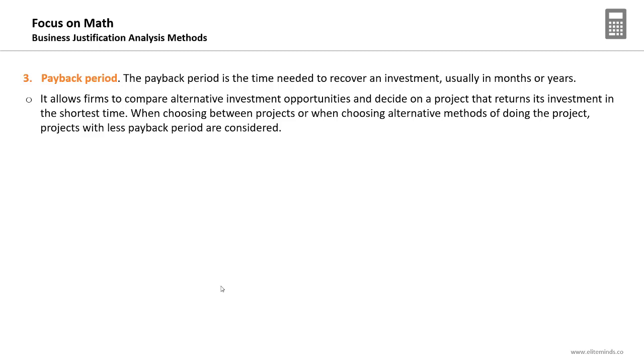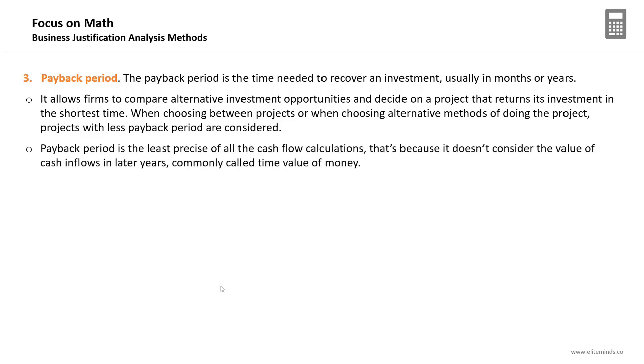So the payback period allows firms to compare alternative investment opportunities and decide on a project that returns its investment in the shortest time. When choosing between projects or when choosing alternative methods of doing the project, projects with less payback period are considered, and that makes sense. You need to look for the projects that will return back your investment in the shortest time period. So lower or less payback period is better.